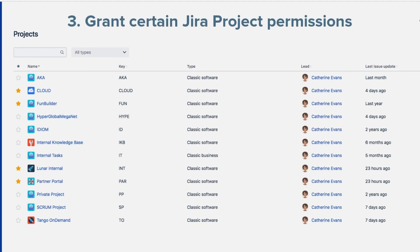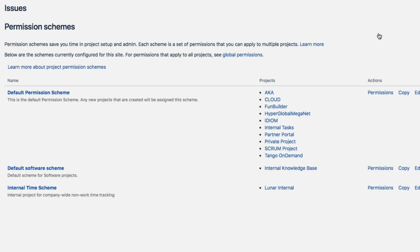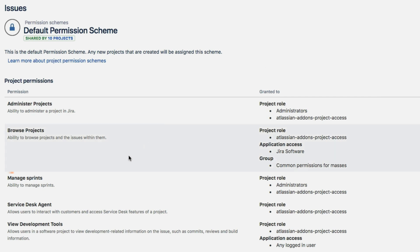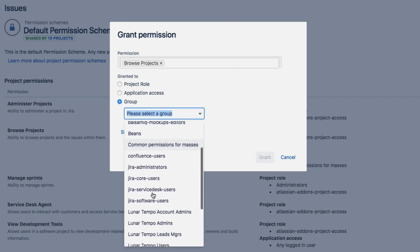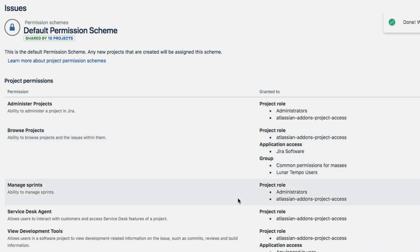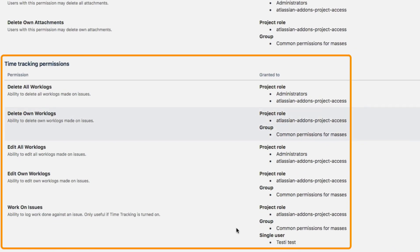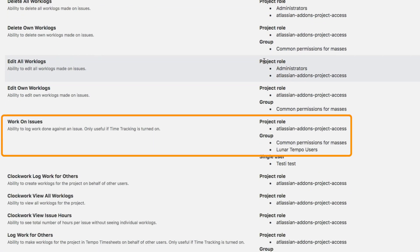Now I need to grant certain project-level permissions to the people who have, or will have, access to Timesheets here at Lunar Industries. So I'll go to the Permissions schemes and focus on the default permission scheme that we use for most of our Jira projects. I'll add the Lunar Tempo Users group to these certain permissions. Browse Projects, which lets Tempo users see all the projects that use this permission scheme — this is a pretty basic permission that's generally required for projects. The Time Tracking permissions are used only by time tracking apps in Jira, and I'll grant the Work on Issues permission to the Lunar Tempo Users group. This is an important one because Tempo Timesheets users need to have this permission for at least one Jira project to be able to log time on issues.